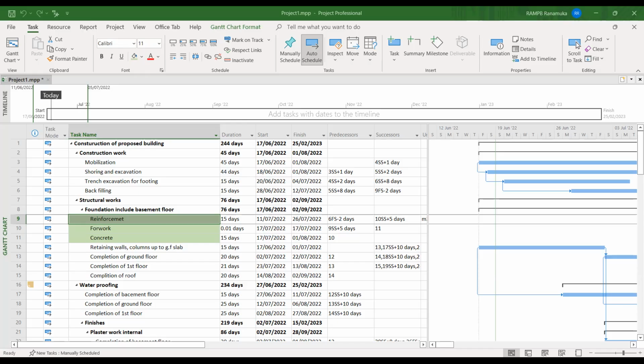Once you prepare a BOQ and list out the works, then directly go to prepare the cost and resource allocation through Excel. It is easy. Directly type it in and do that in MS Project. Why I'm telling this is that otherwise you have to go into each and every activity and add the resources and assign resources. It is a big lot.